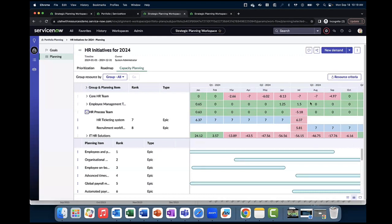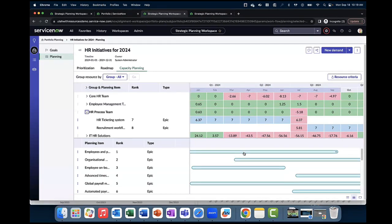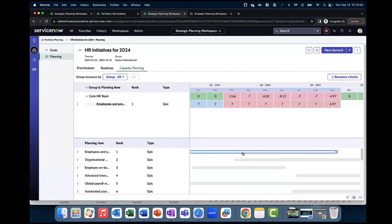At the top right, the heat map shows us where resources have been over-allocated. A blue cell will indicate unassigned resources. And in the lower tray, you can drag and drop planning items to change the date or the duration of a work item. If you click on a planning item in the lower tray, it will highlight the resources that have been assigned to do that particular work item.